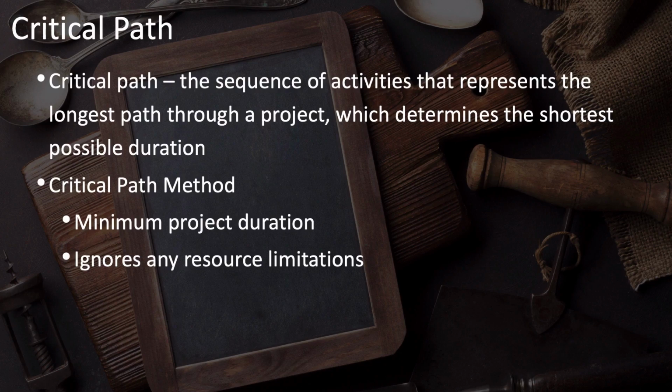The critical path method focuses on calculating the minimum project duration, and this is important, ignores any resource limitations. Resource limitations are factored in later, after you've gone through the critical path method.